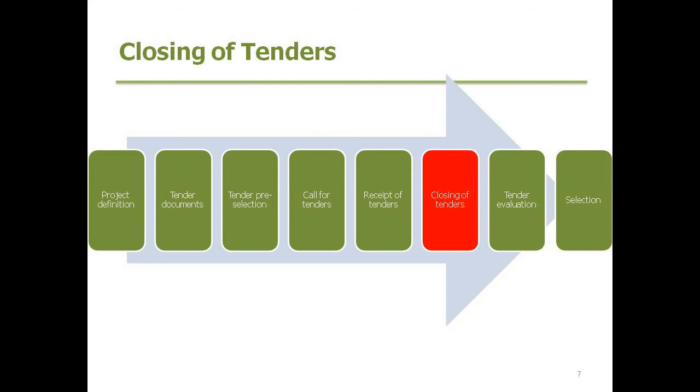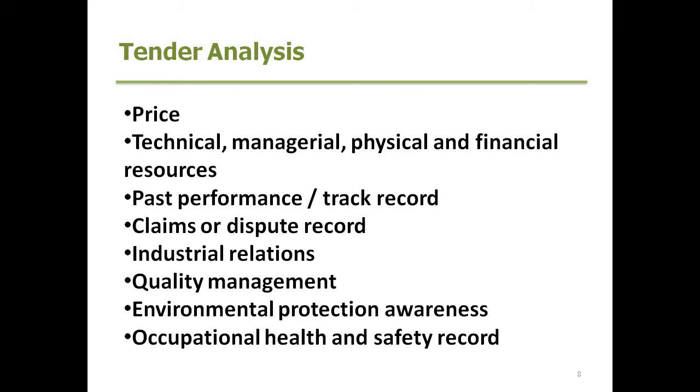Once the tenders are in, the tender analysis and evaluation has to begin. I've listed here those more important headings to put in your evaluation matrix. A rating system is extremely important with this as well. Some of these issues are going to be more important to you than others, and some have got more contractual risk than others as well, and as a result then there's a commercial involvement there as well.